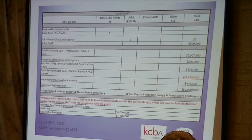And I want to be very clear, getting to the $55 million, because ultimately it's my responsibility on this recommendation. In order for us to get to the $55 million figure, we are sacrificing contingency. We're going from a very modest contingency of $2 million, which is already thin. We're taking another $795,000 off of that contingency. So I don't want anyone to be surprised, because in the history of projects like this, when you do major renovations, you typically uncover things you're not expecting. What would happen if that were to occur is the dreaded words change order, to bring that back into the project, and the cost changing.